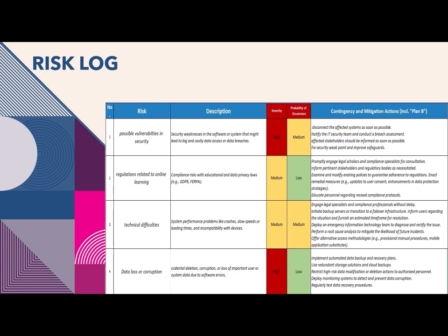And how it works is that it lists problems or risks and creates action plans for each risk. Key elements to include are the risk description and its potential impact, the action plan to manage it, how severe it is, and the probability of occurrence.